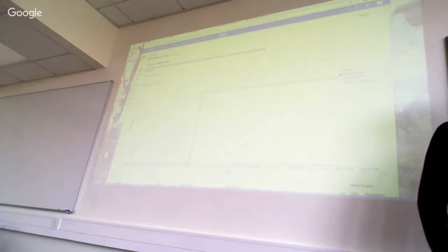And I think if you have been using hours and you record hours, there will be a natural step down as you register hours, because then you have the estimate and you have the actual work hours. When you use story points, you have to close them as early as possible to show progress. So that means you need to have short tasks, and you need to complete them continuously.